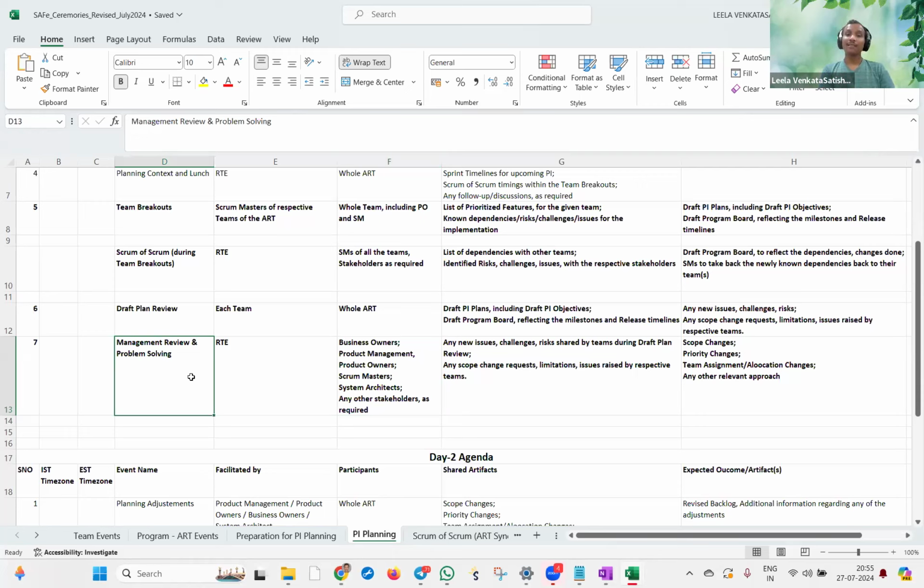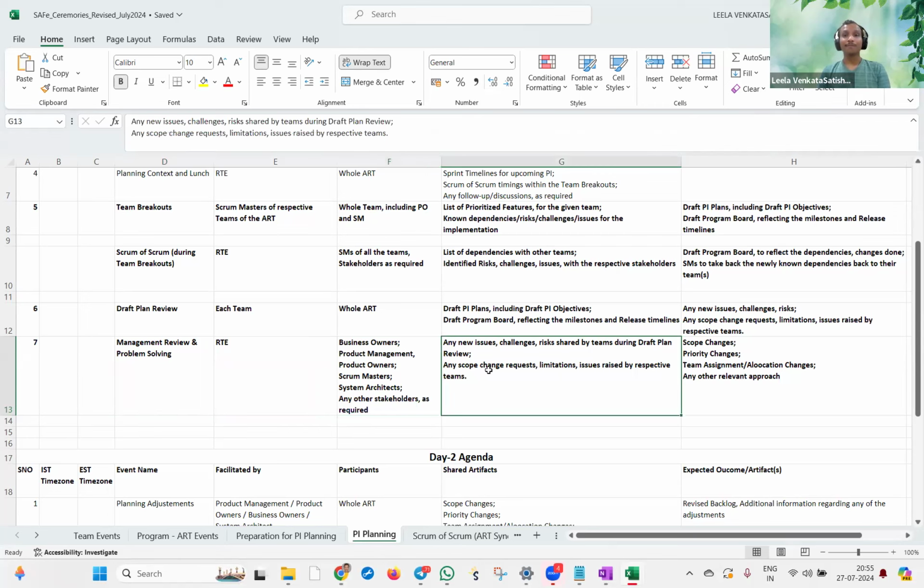Now the management roles, whoever came across the entire plan, will say, hey, we planned to launch everything, the QBank as an application, but the teams are raising a concern or a challenge. So let's revise the scope. Instead of launching the entire mobile app, let's focus only on Android as a first step, then iOS is the next version. Yes, that scope change might happen.